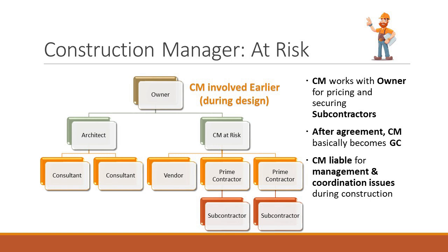And they work hand in glove with the architect and the owner on pre-construction services to eliminate waste and to make sure that there are fewer questions, the RFIs, the other change orders, because the contractor, or in this case, the construction manager at risk, is involved earlier. So they have a better understanding of what the owner and architect want, instead of, I'm just bidding on a set of drawings I just saw.